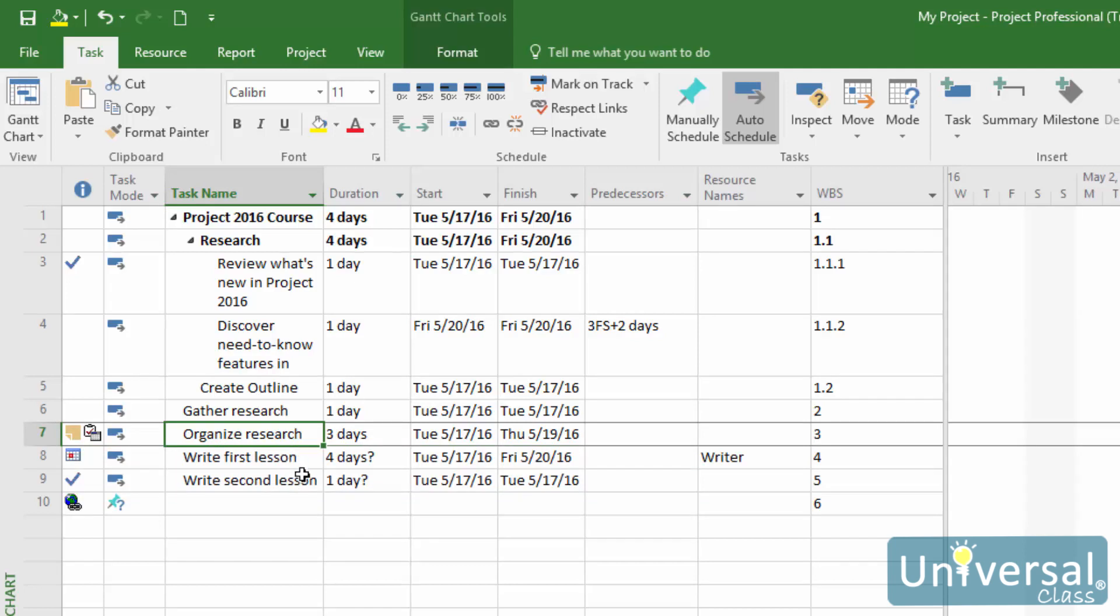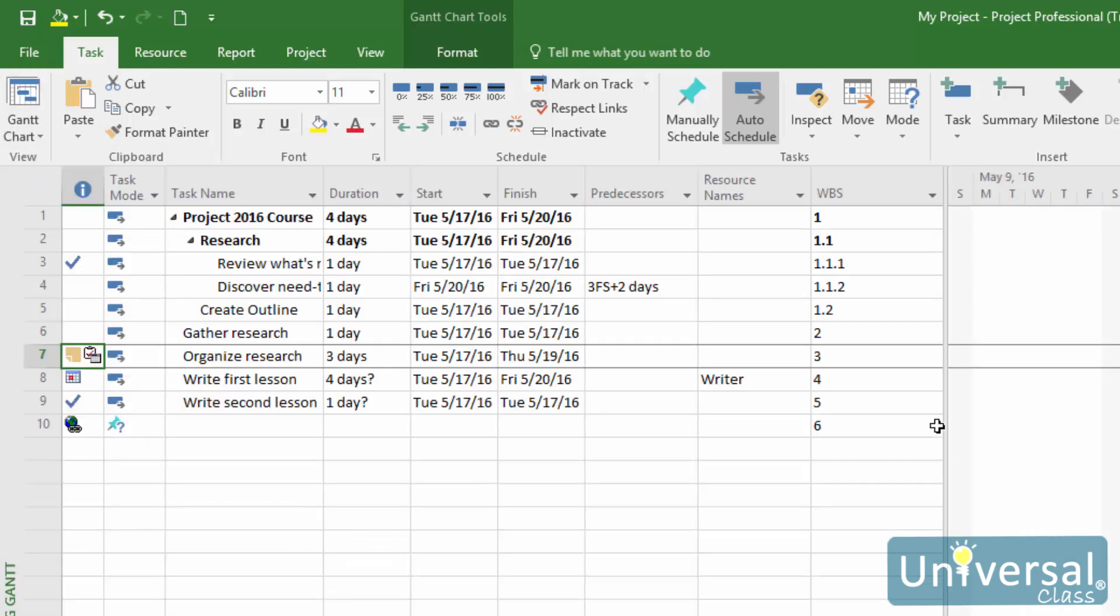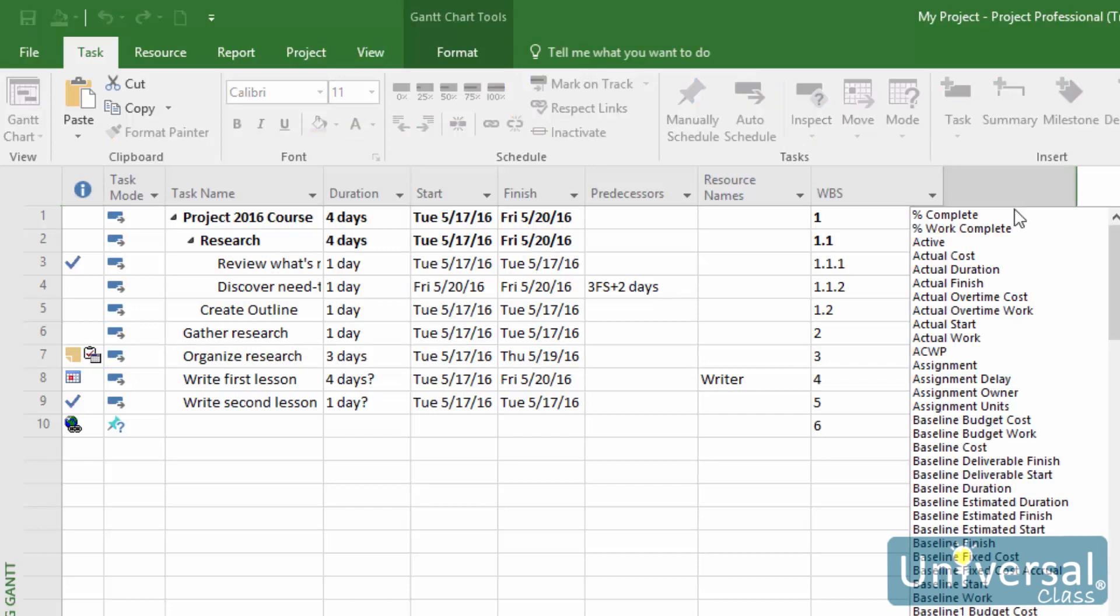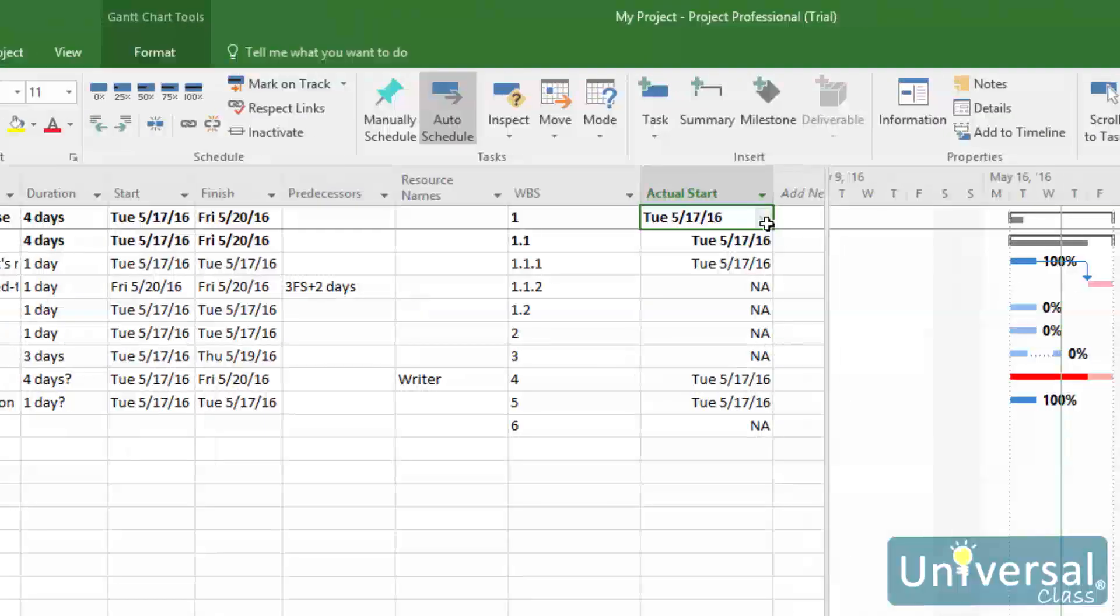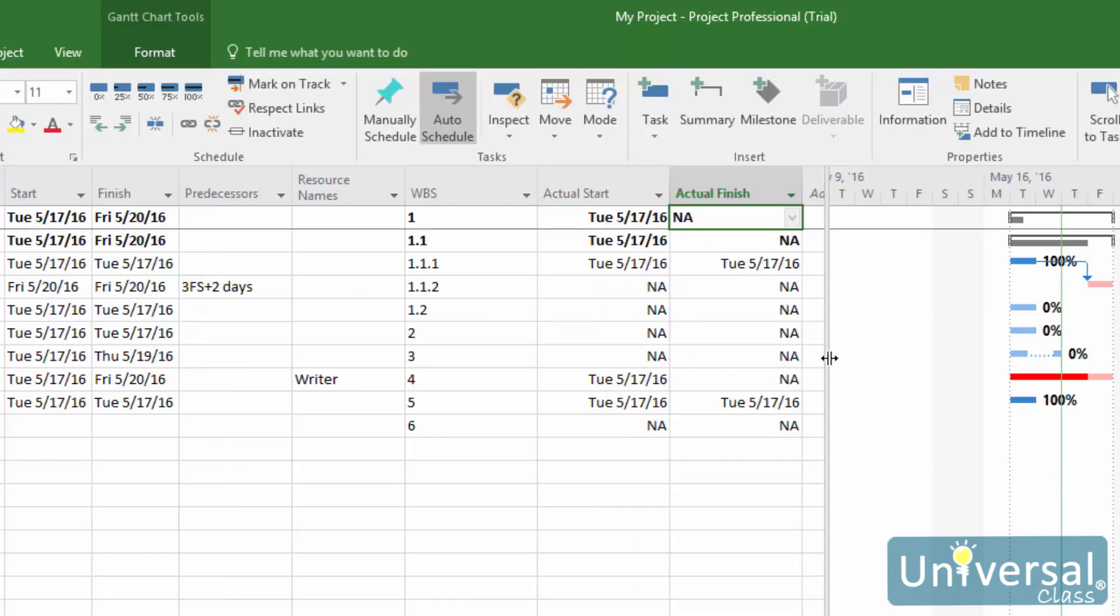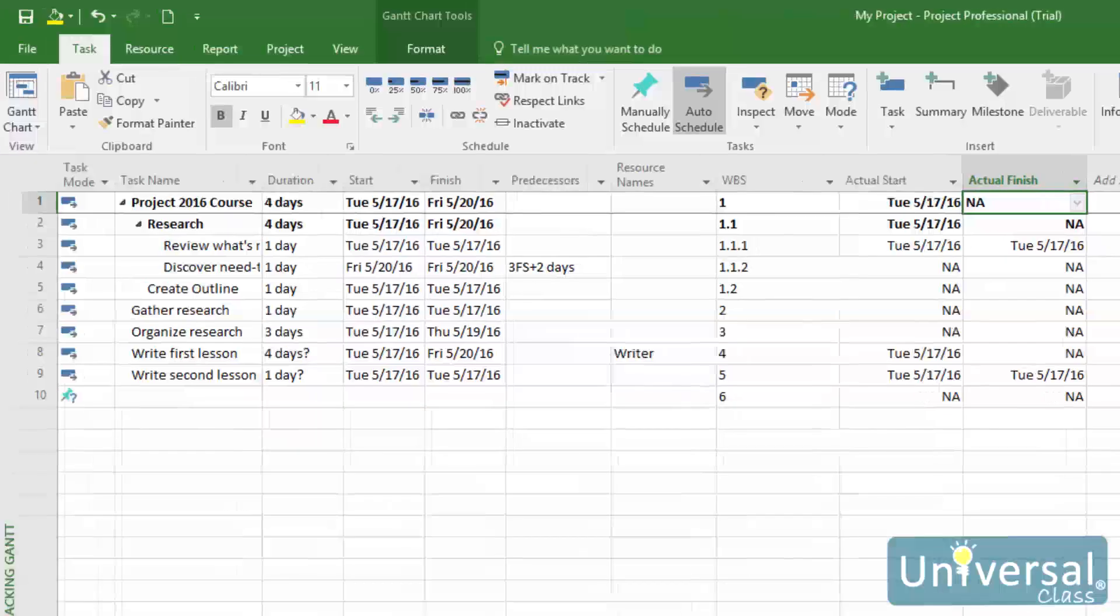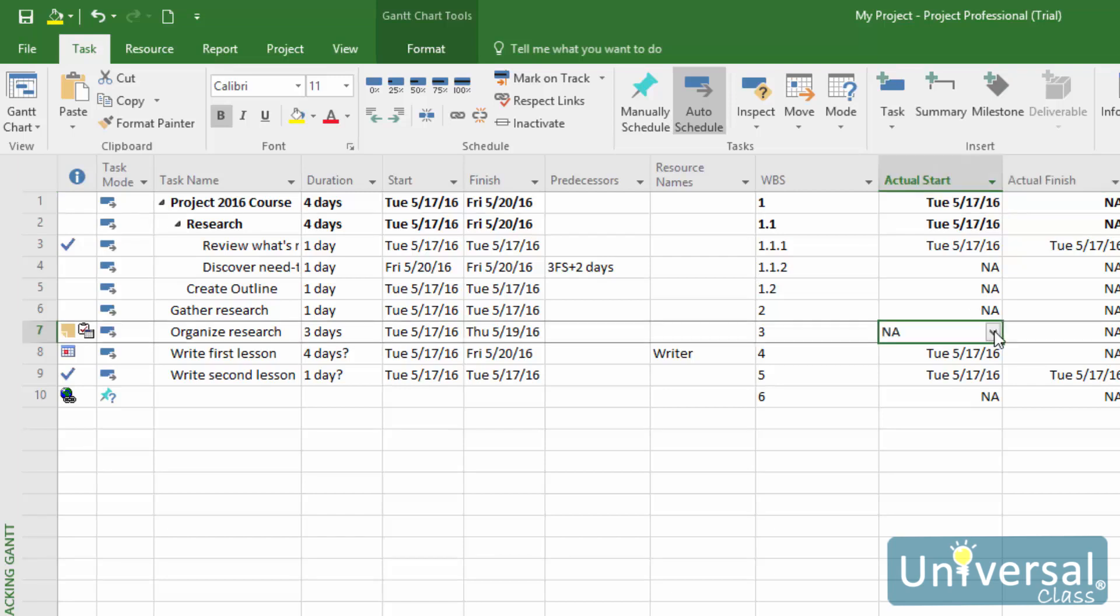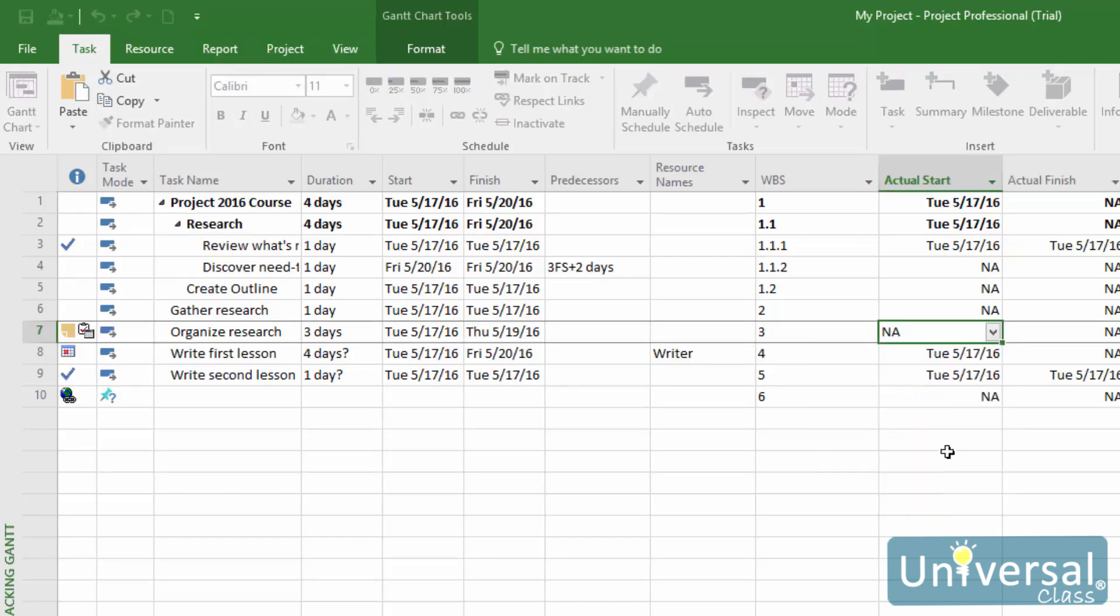To go to this view, click the dropdown arrow for the Gantt Chart button under the Task tab, then click on Tracking Gantt. If you don't see the Actual Start and Finish columns, you can click on Add New Column and select Actual Start and Actual Finish. You can use the dropdown to select when the actual start date and finish date were.